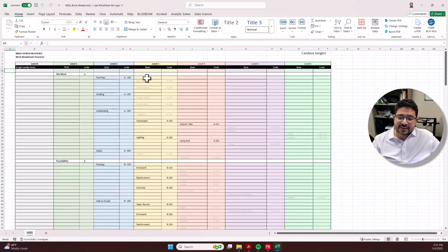You're gonna see that we have up to level 4 items, but you're gonna see other items grayed out. The person who did this was already considering some activities for those items, and didn't want to forget those activities, so added them here. That's okay, but in the software itself, there's a big differentiation between the structure of the WBS and the activities themselves, all right? And we're gonna see that in this lab.